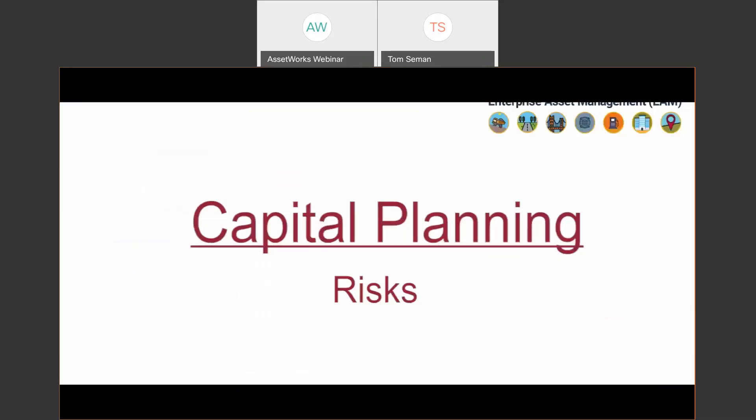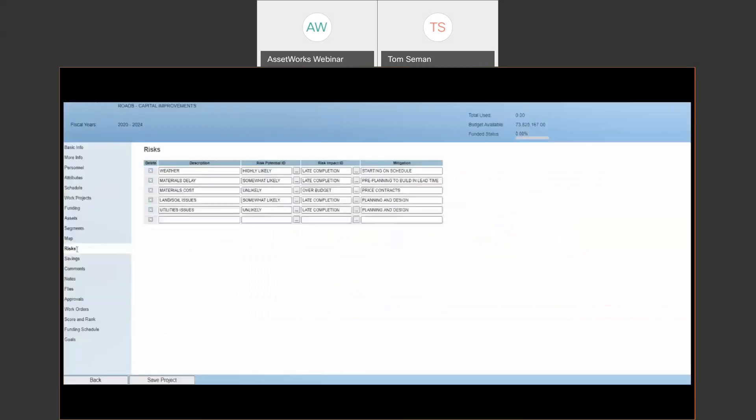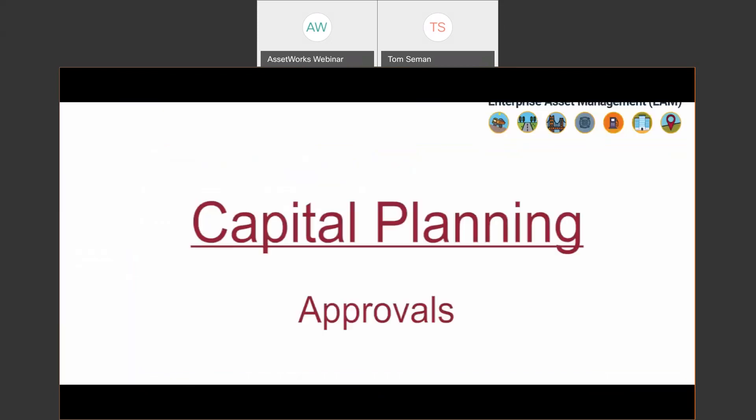There's also the ability to track risks within the projects themselves. These risks are validated fields, so you can reuse them. They're reportable and you can permission them accordingly as to who has access to this.